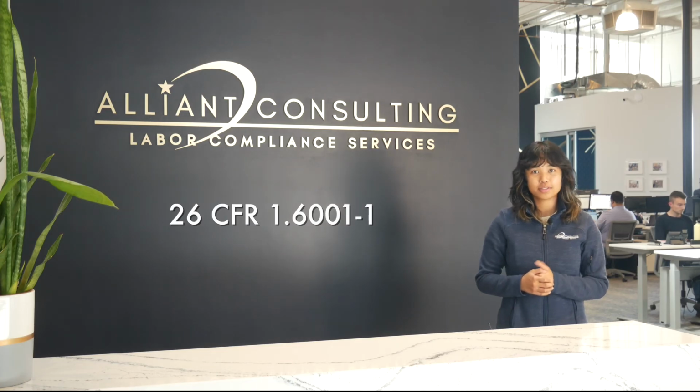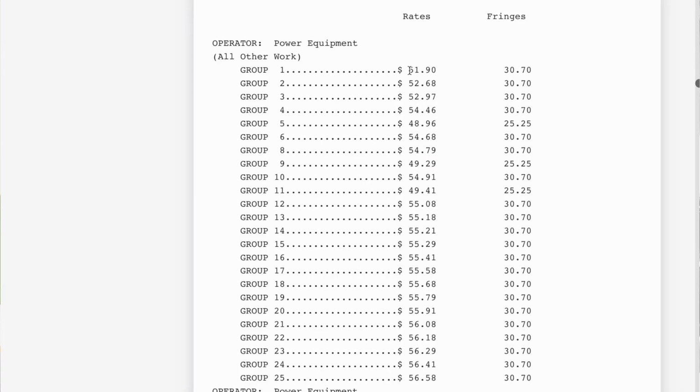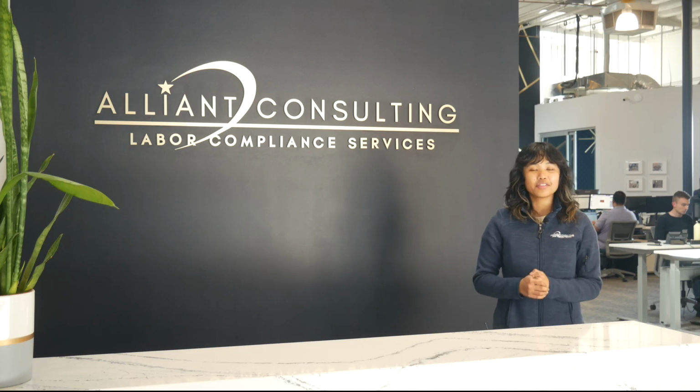record-keeping requirements. After obtaining your correct classification and its corresponding rate, you will have a base hourly rate and fringe payment to be paid to your employees. The taxpayer's responsibility is to ensure that the correct total hourly rate is paid out to all employees, which is the sum of the base rate and fringes. Be sure to check for any footnotes or possible additions within the wage determination. And with that, you found the beginning of construction for your project and the applicable wage determination.